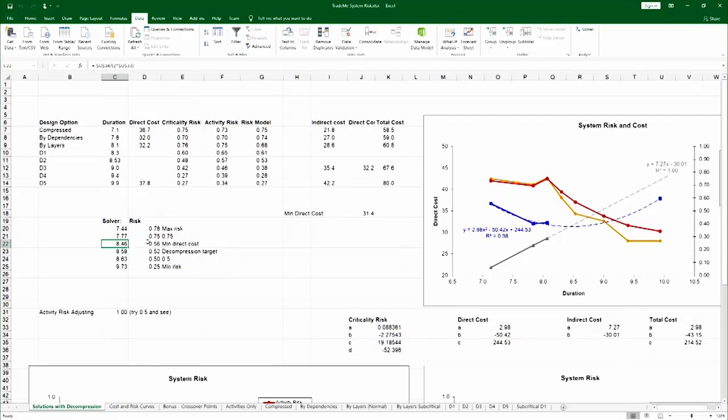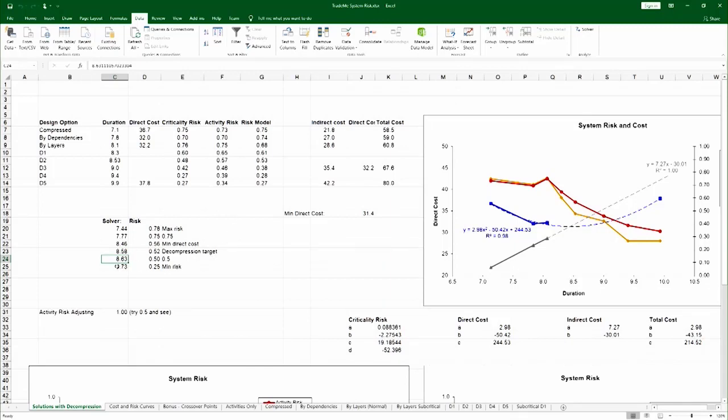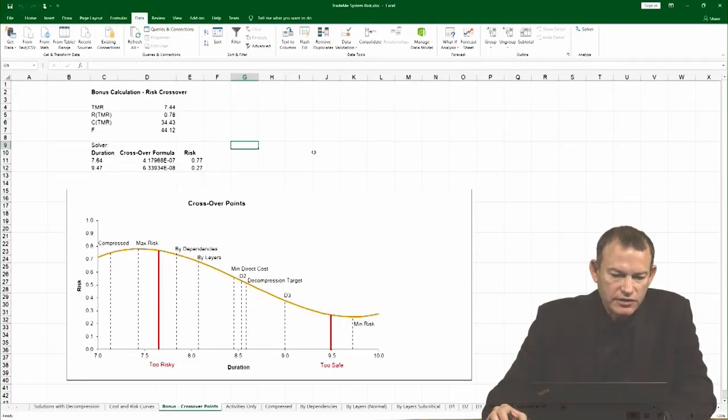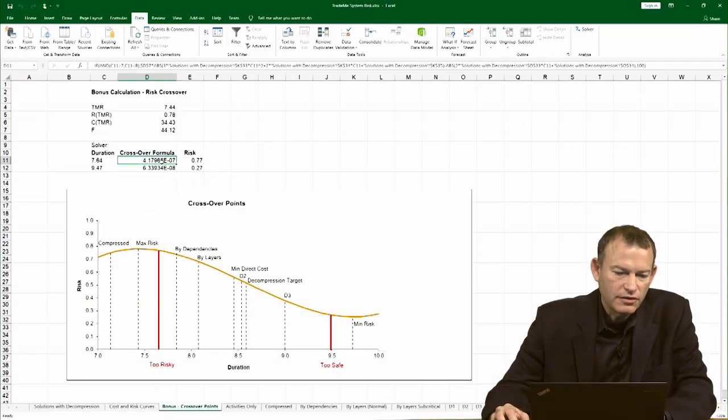Much the same way you can find the decompression target, which is the second derivative equals zero on the risk curve, the point of 0 at 0.5, and the point of minimum risk at 0.25, and so on. For the risk crossover point, this is completely parameterized.